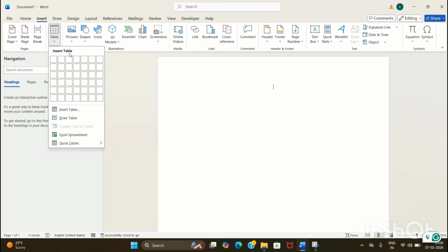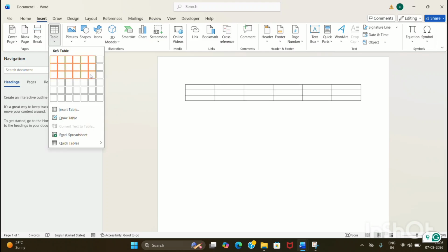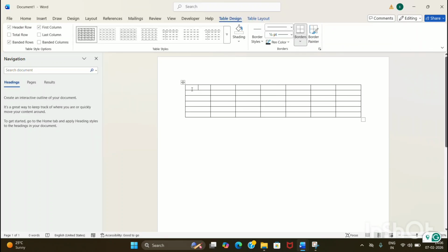First I'll go to Insert and create a table and choose the rows and columns as per my convenience or as per the tasks. We will list the research activities or the task activities in the first column, and the name will be tasks or activities. The second column name will be the time. Here I have created months, but for now I will show you as week 1, week 2, week 3, week 4, week 5 and week 6, and it goes on. I'll also create other columns one by one.